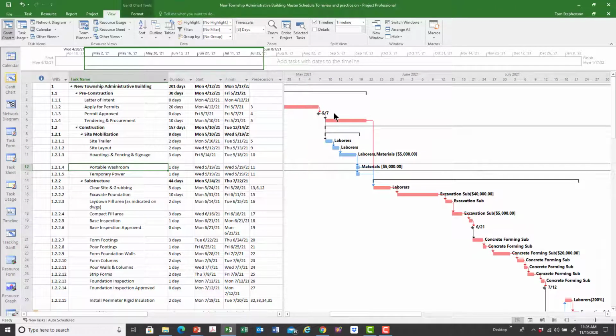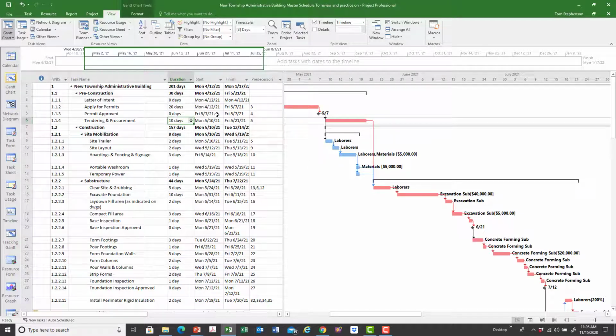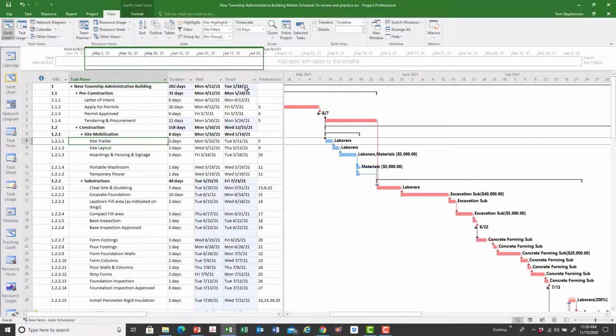And I can see the critical path. Anything on the critical path, if it takes longer, my project takes longer. So my project's set to finish in 2022. If I make, and what's that, January 17th, if I make that 11 days, now it's the 18th, right?